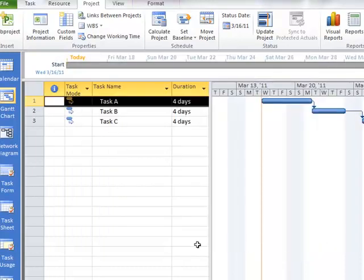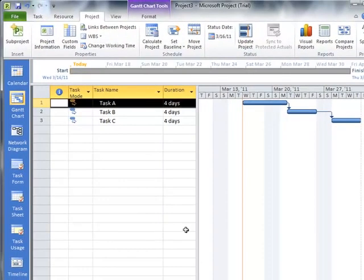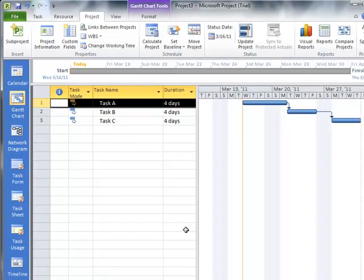We can also do the same with Resources. We can go to a specific individual, and we can apply a specific calendar for that individual. Maybe they only work on Monday, Wednesday, and Fridays of a given week.